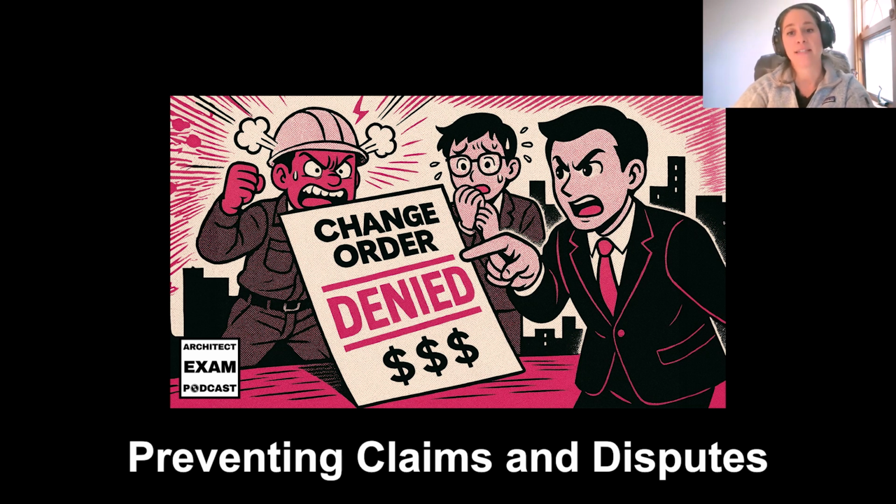Effective communication practices make a huge difference too. So be sure to hold regular project meetings with documented minutes that track decisions and action items, and then distribute information to all relevant parties after meetings, and also follow up on any outstanding issues that were talked about. Also, at the start of a project, implement a structured RFI process with clear tracking systems.